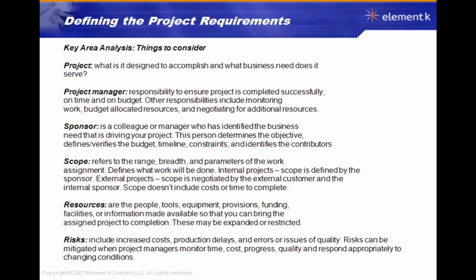It defines what work will be done, essentially. And if it's an internal project, the scope is really defined by the sponsor. And if it's an external project, the scope is actually negotiated between the internal sponsor and the external customer as well.